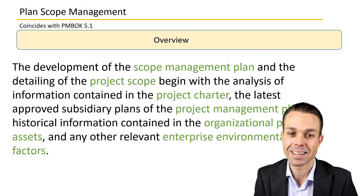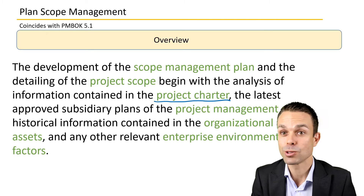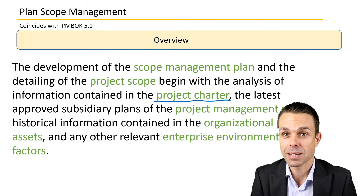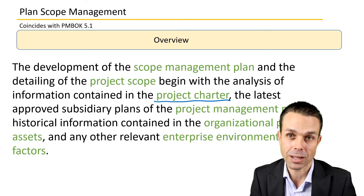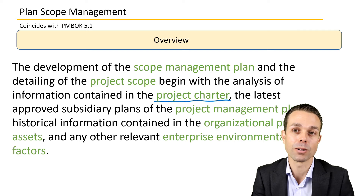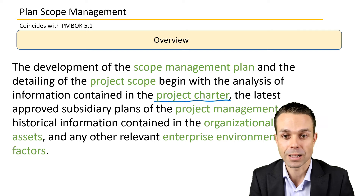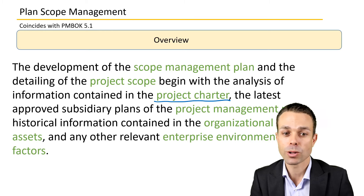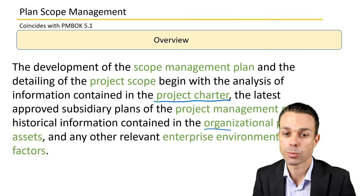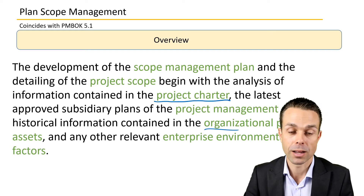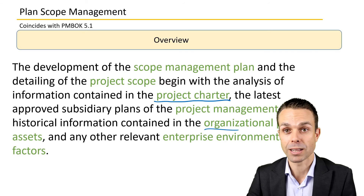The development of the scope management plan and detailing the project scope begin with the analysis of information contained in the project charter — that's our initial document used to initiate or kick off a project. It will have a high-level idea of what we wanted to deliver, but it won't be well defined yet. We also reference the latest approved subsidiary plans, historical information in organizational process assets, and enterprise environmental factors like regulations or standards.